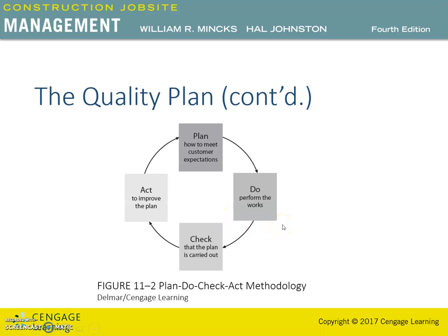So I was talking about the plan check act methodology. The plan step includes many things. For example, also we talked about the determination of the inspection of material delivery, job ready conditions, work in progress, completion, and punch list. So plan also includes the plan for remediation of defects prior to the completion of the project.